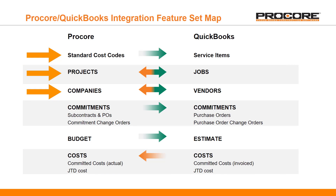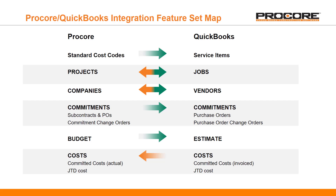If we focus on just the first three rows on this diagram, these are a few of the areas that we believe our customers are saving a ton of time with the elimination of manual or duplicate entry. First, you can take your standard cost codes in Procore and sync them to QuickBooks where they are used to create service items in the item list. You can then use those service items to allocate your costs on transactions that you enter for your projects in QuickBooks.